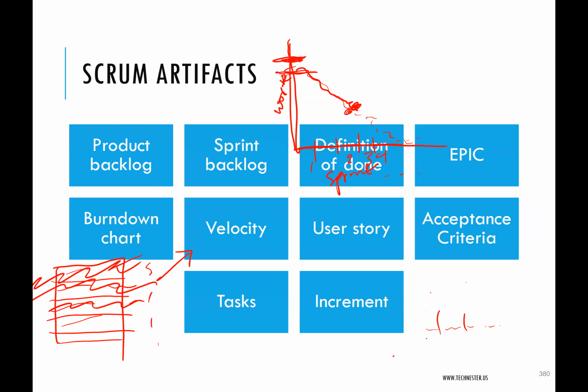So maybe, if we're using hours now, it took them 40 hours to complete the tasks they were assigned in sprint A, and it took them another 38 hours to complete the tasks in sprint B. Then their velocity in hours will be an average of 40 plus 38 divided by 2. This is 20 plus 19, which is 39. So their sprint velocity in hours will be 39 hours.